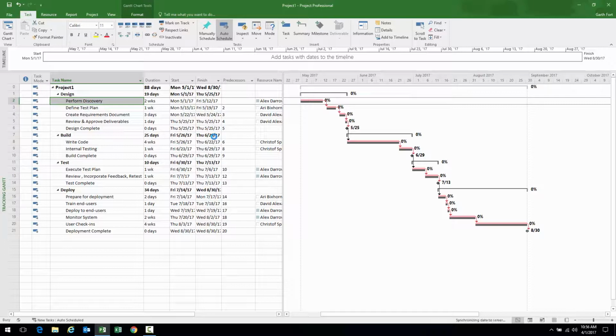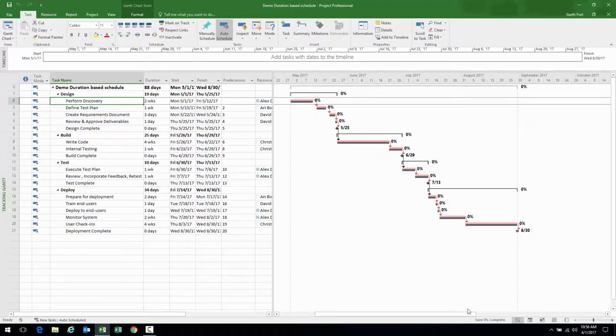That's something I should have done earlier. Save often, save frequent is usually the term. You'll notice in the bottom right, the save status is alerting me to where we are with this save. Right now the project is being saved to the draft schema in the database. Therefore, if you tried to look at it in Project Center in Project Online or Project Server, you would not see it. You actually have to publish the project to see it in Project Center, which I have not done yet. Therefore, we're still at 0.